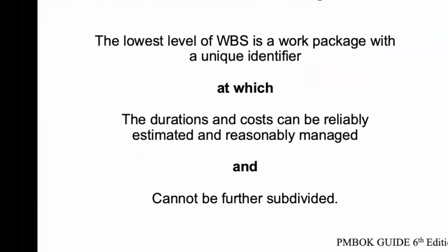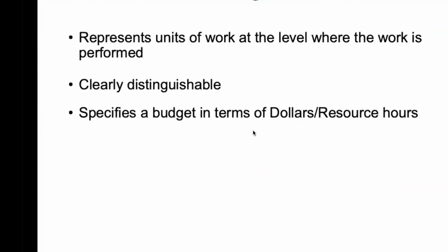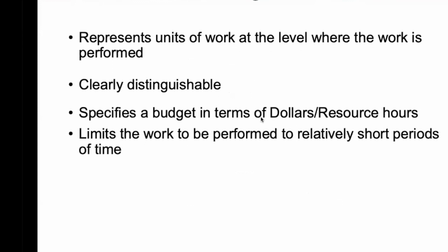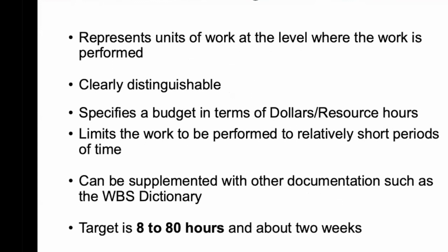That's where you stop. In the assignment, I want you to stop there as well. You stop where you can't really go further, okay? Also, it's clearly distinguishable, and that's the rule of thumb. And it requires 8 to 80 hours. So from 1 day to 2 weeks, okay?